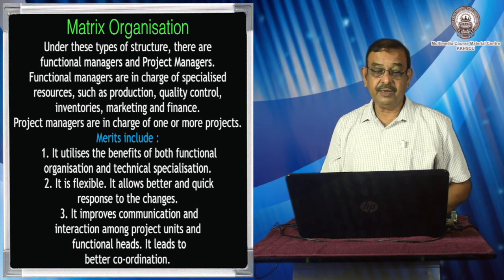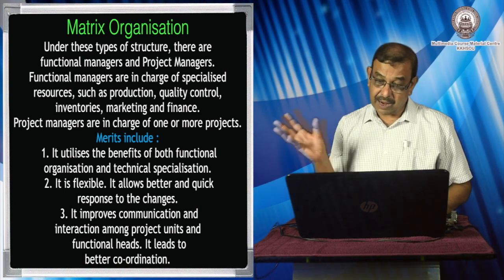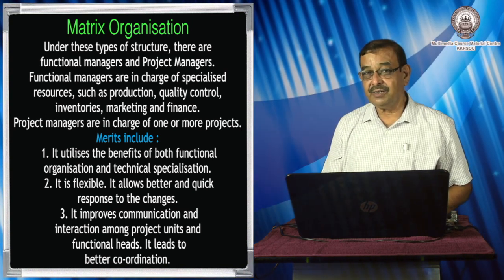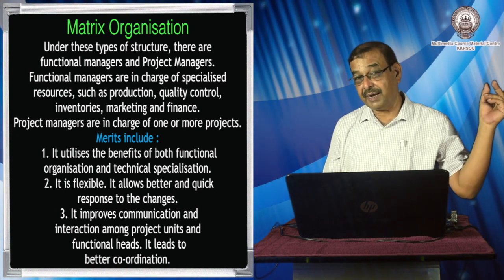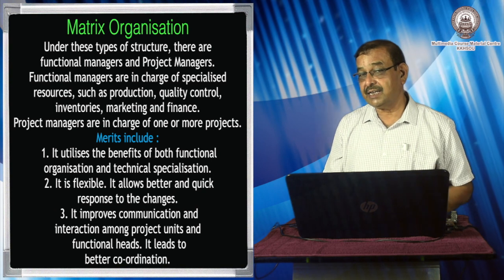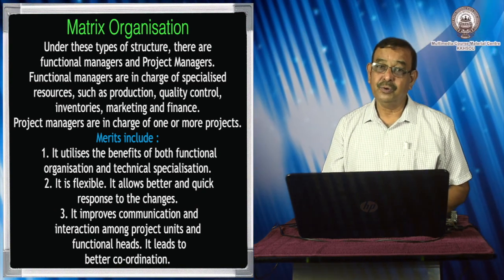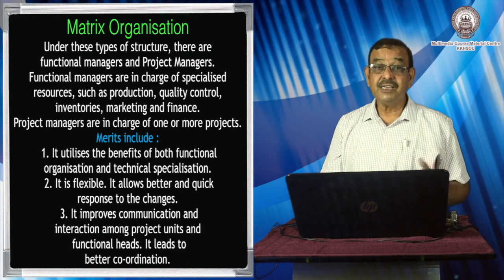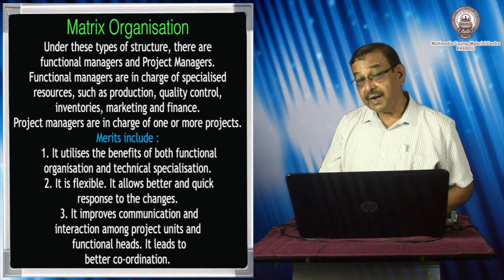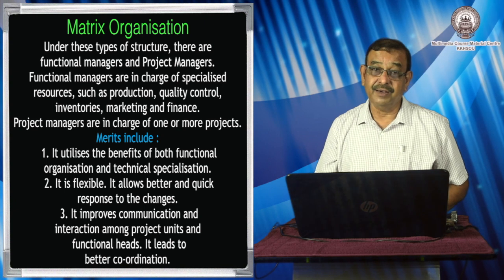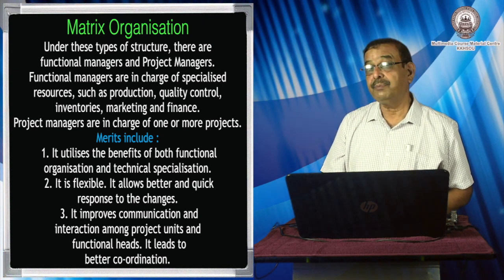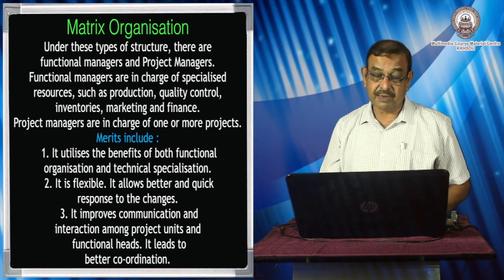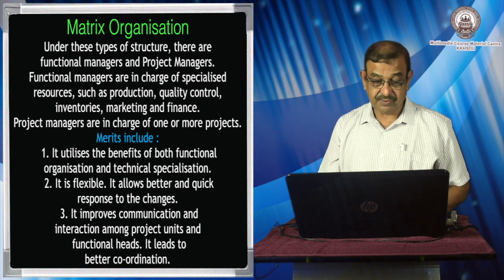The merits of matrix organization: it utilizes the benefits of both functional organization and technical specialization. The Chief Engineer Electrical is more experienced and we can avail his expertise, while also utilizing the experience of the electrical engineer stationed at the project. It is flexible and allows better and quicker decisions at the project level. It also improves communication and interaction among project units and functional heads, leading to better coordination.